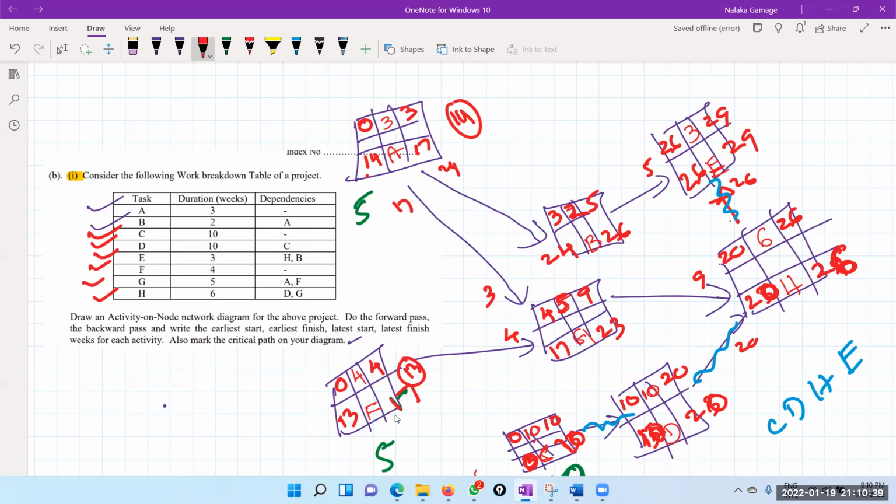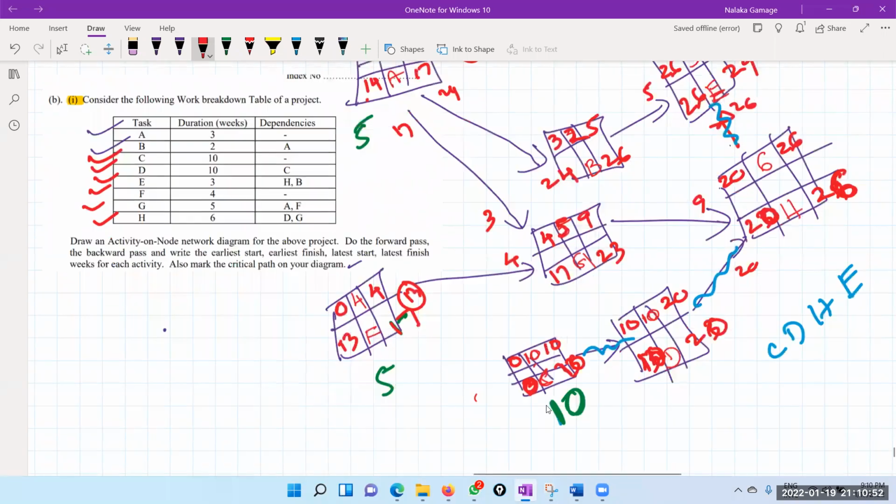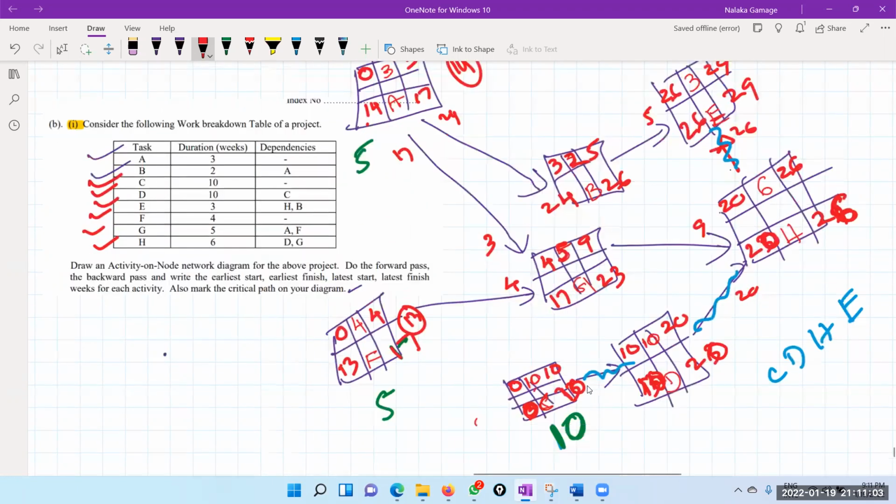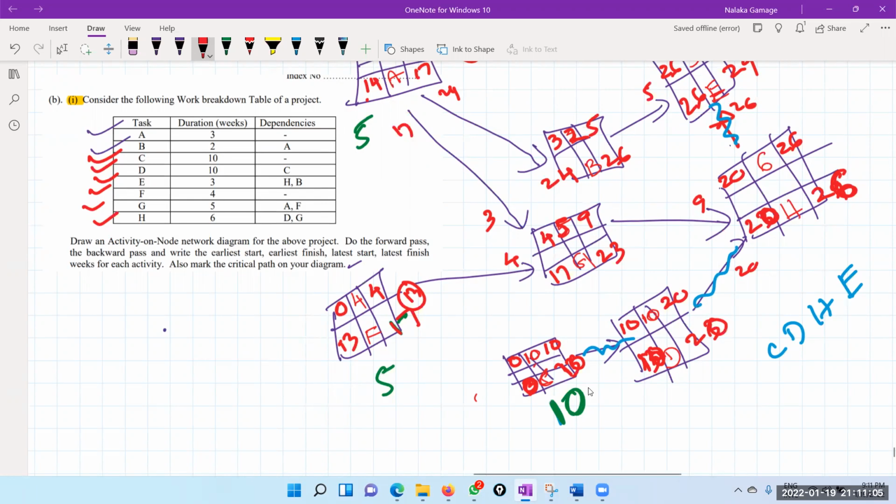13 and 14 days. So therefore, we can start those two tasks at the end of the 10th day, because 10 plus 3 is 13, 10 plus 4 is 14. We can delay it until 17. So then those 10 computers are available, right? Of course, the other tasks are happening. Then these 10 computers are available for your class tasks F and A. So therefore, it's even better. Otherwise, you need 15 computers. Now you can survive with 10 computers.